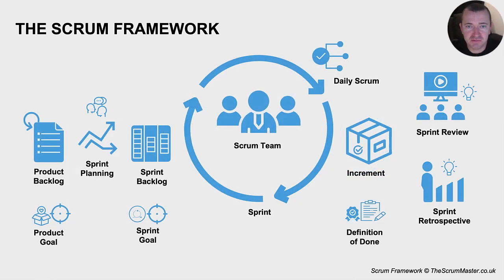Here is a short overview of Scrum and how all the pieces fit together. Work is completed in short cycles of less than 1 month, called sprints. The product goal represents the long-term objective for the Scrum team and details why the work is valuable. The work to be done to reach the product goal is held in an ordered product backlog, which the product